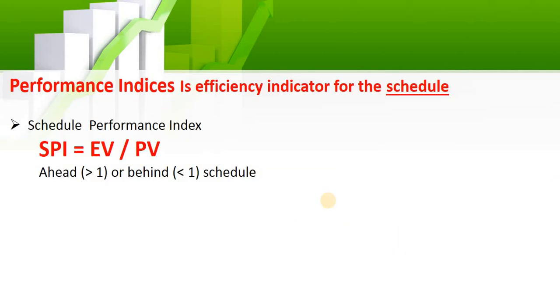The SPI, which is called the Schedule Performance Index, is the earned over planned. If it is greater than one, you are ahead of schedule. If it is less than one, you are behind schedule.